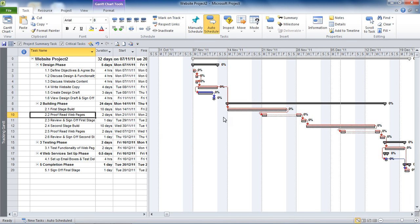Milestone tasks are easy to add. There are two main ways of doing so, and we're going to start off with the first way, which is the preferred method: inserting a normal task and creating a milestone task from it by entering zero duration.